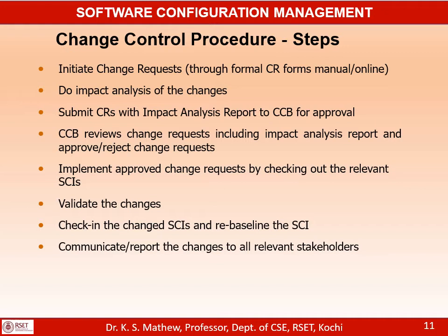Once the change request is approved, the project manager or project leader will assign some team members for implementing those change requests and give access to those work products that have to be changed to implement the change request, and the CMIC will give modification rights to those team members assigned for implementing the change request.